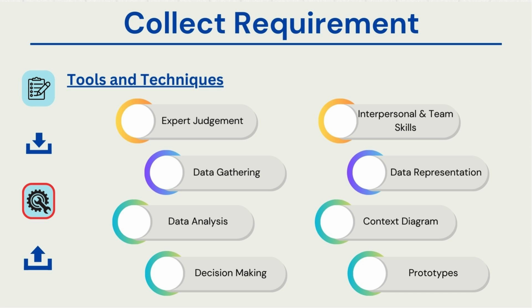Decision-making is definitely one of the important tools that we use. There could be small techniques within decision-making, such as a simple voting technique to ensure that everybody is engaged and involved. There could also be multi-criteria decision analysis, which considers various criteria such as cost, quality, and resource availability, and how those factors impact the decision. Many of these criteria would be available for reference while making decisions.